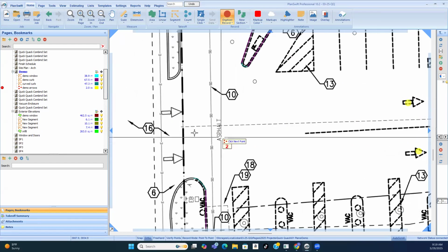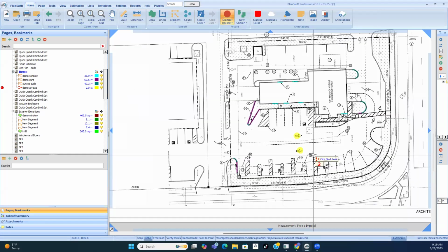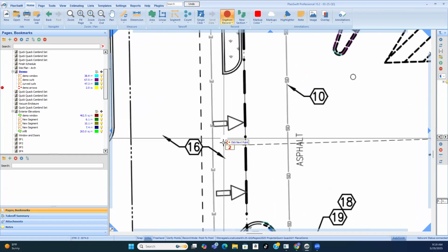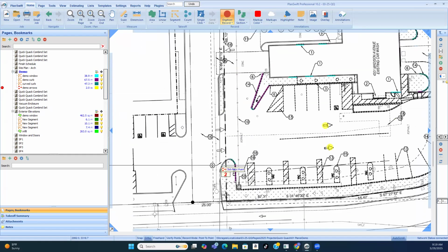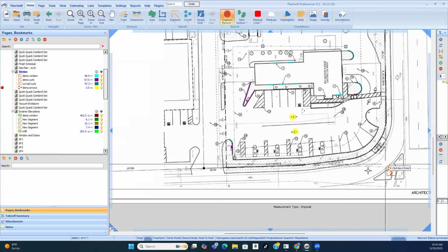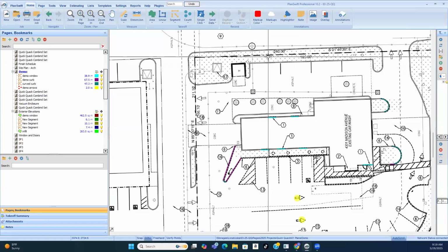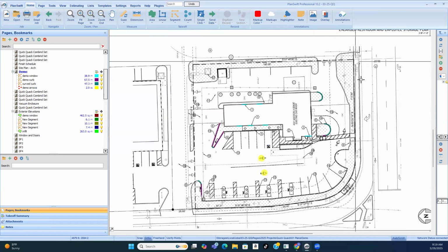That deep broken line says demo me, where that one we're keeping for some reason. Is that called a broken line with the other arrows that you say we're keeping? Is that considered a broken line that it's pointing to, right here, this one? No, that is actually the construction perimeter. You'll always have that. Let me show you. It's confusing because it's a broken line, but that's understood to be the construction perimeter. See how it goes all the way around? So there's no construction outside of that perimeter. I see. That's confusing too.